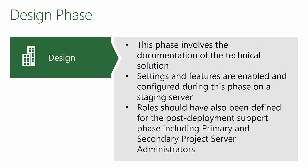Then we move on to the design phase, which means we're taking those requirements and building them out into the tool — actually designing and configuring the environment. This is also where instances will be provisioned in the case of Project Online, or additional servers will be set up for an on-prem environment.